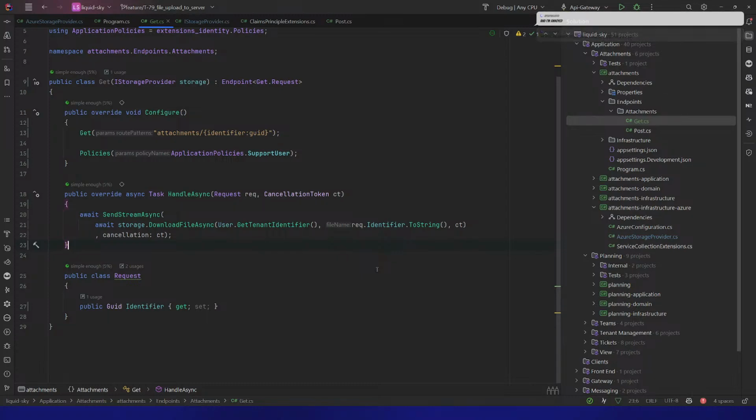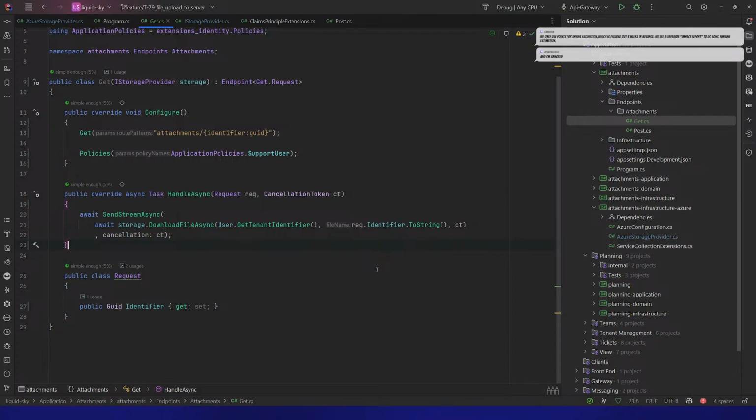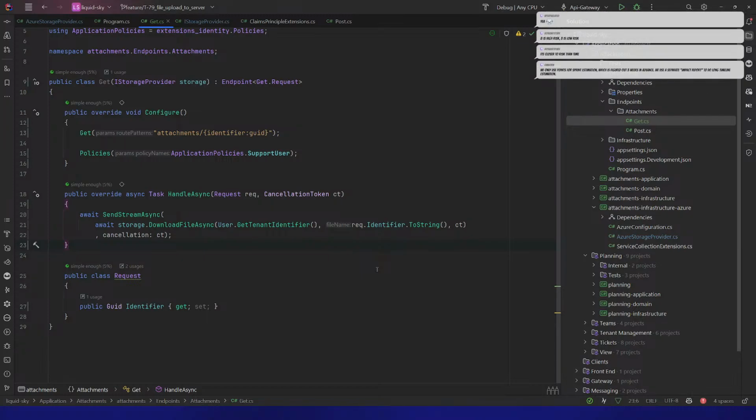We went backwards from story pointing to story points equals days, and I'm annoyed. Oh, your organization regressed a little bit on the story points. We only use points for sprint estimation, which is figured out 3 weeks in advance. We use a separate impact report to do a long timeline estimation. It's closer to risk than time. 8 is high risk, 3 is low risk.